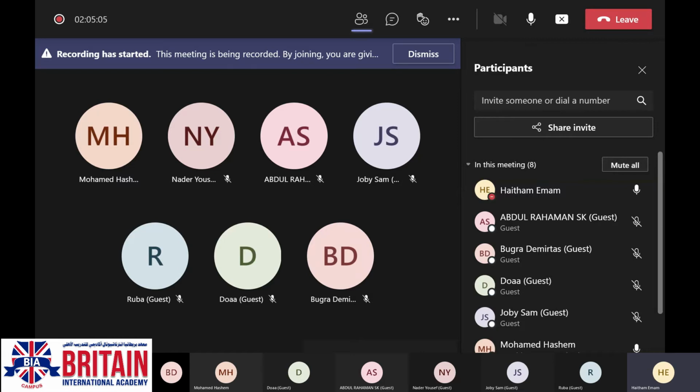But when I'm going to compare between two products, and I'm going to make analysis based on their cost of disposal, cost of acquisition, cost of operations, that is called life cycle costing. But when I'm going to talk about how to maximize the value of this product, that is called value engineering.